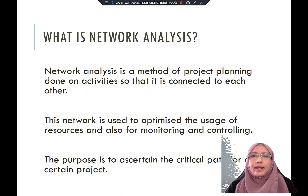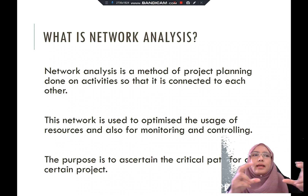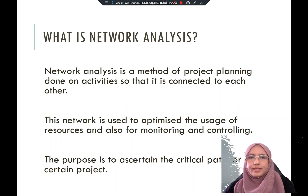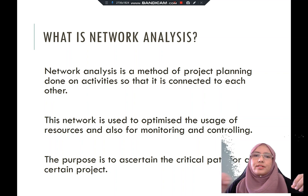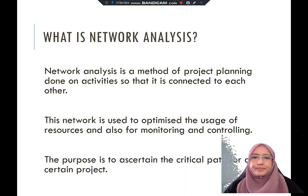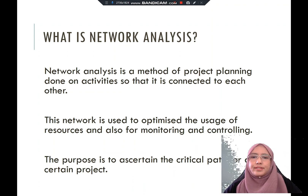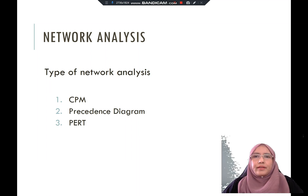Network analysis is a method of project planning done on activities so that they can connect to each other — from activity one to activity two, activity three — creating a relationship from one activity to another. It can also optimize the usage of resources for monitoring and control. The purpose is to ascertain the critical path for the project, which determines the total project duration. There are three types of network analysis: critical path method, precedence diagram, and PERT.